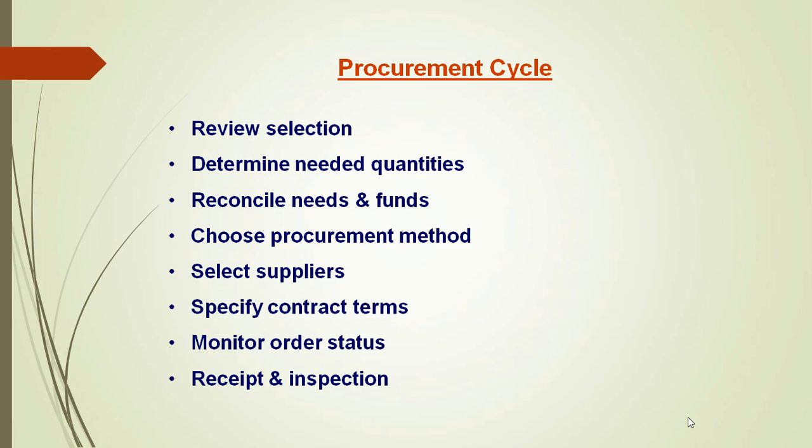First of all, identification of the need, then asking for quotations. Once you have finalized what needs to be procured, then ask for quotations, looking at the quality, the cost, the services, taxes and all the parameters. We need to have a comparative quotation, and after making all documentation, we need to pick the minimum one with the best review and the best services. That is the review selection.